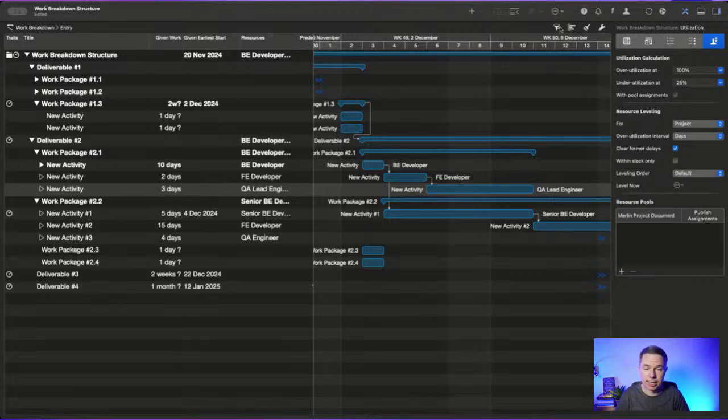And the biggest mistake that I notice while working with project managers is that they forget to include the holidays calendars, and they map out the whole project, do all this work, and then they realize, okay, but there are holidays, there are some days of official or national holidays, and they mess up the whole schedule. Because of that, nothing works. Everything stretches out after you include them, and it creates a lot of mess.